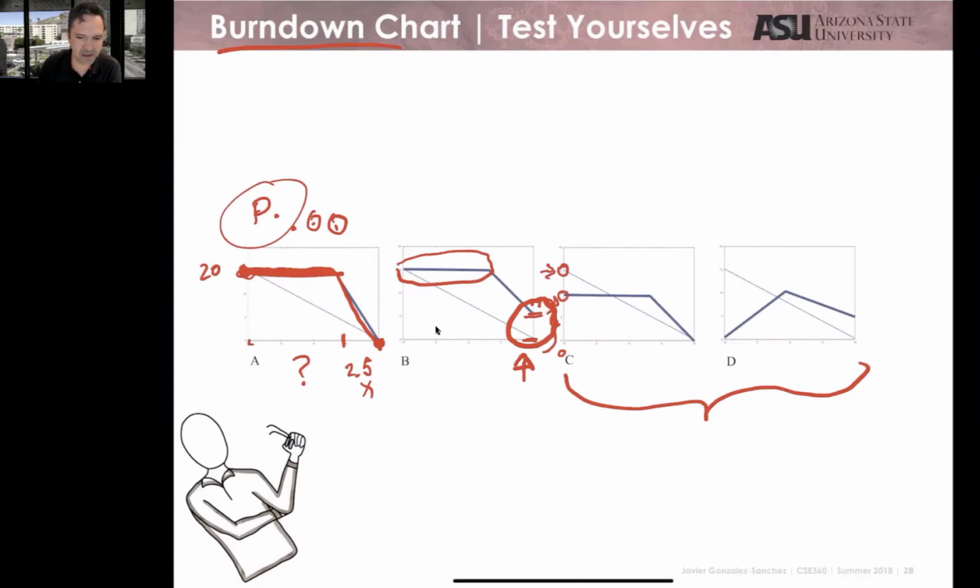It's like you tell me that you start with 20, but then here you tell me that in day 0, I mean, you haven't started to work and you have, I don't know, 10. How did that happen? Again, it's day 0. It's your starting point. The 2 points are going to be together at the beginning. And this one, very, very important: the line is supposed to go down.